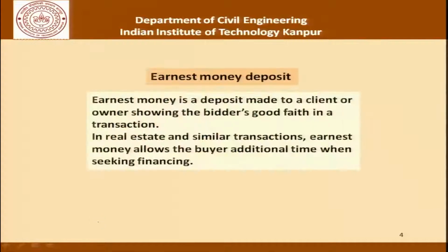So the first thing that comes to mind is the earnest money deposit. The earnest money deposit is a deposit made to a client or the owner showing the bidder's good faith in a transaction. As far as real estate and similar transactions are concerned, earnest money allows the buyer additional time when seeking financing. So basically, if the buyer has to finally pay an amount of X to acquire an asset or to buy or procure something, by paying a fraction of X,